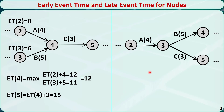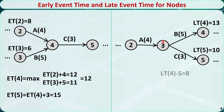This is a part of another project network with activities A, B, and C. Their durations are 4 days, 5 days, and 3 days respectively. Activities B and C are successors of activity A. Suppose we know the late event times for nodes 4 and 5 are 13 and 10 respectively. Let's find the late event time for nodes 3 and 2. The latest time node 4 can happen is at time 13, and the duration of activity B is 5, so the latest time node 3 can happen via B is 13 minus 5, equal to 8. The latest time node 5 can happen is at time 10, and the duration of activity C is 3, so the latest time node 3 can happen via C is 10 minus 3, equal to 7.